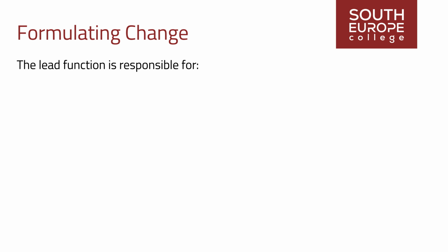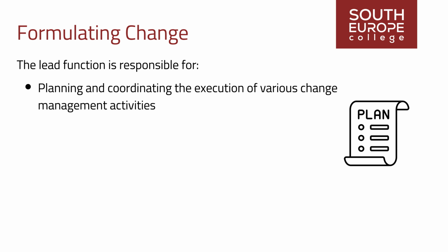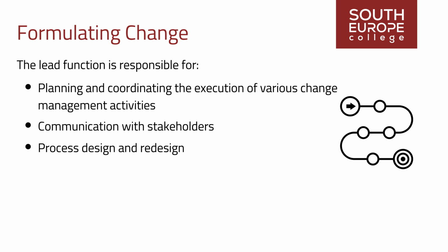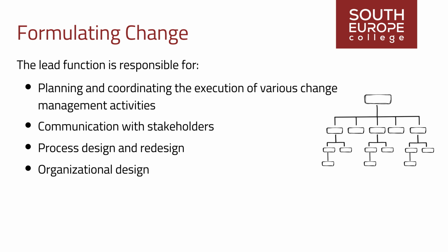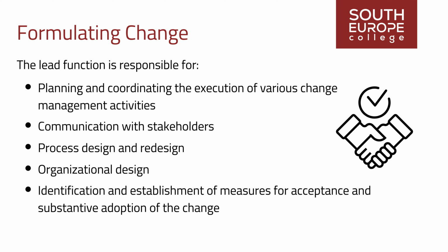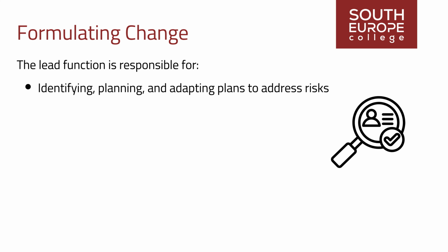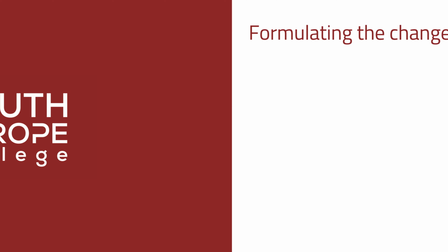The lead function is generally responsible for planning and coordinating the execution of various change management activities in a project, including communication with stakeholders, process design and redesign, organizational design, identification and establishment of measures for acceptance and substantive adoption of the change, and identifying, planning, and adapting plans to address risks, such as resistance to change.